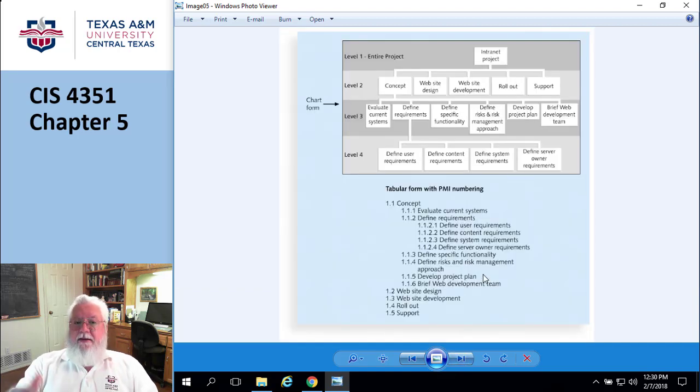So here they introduce a new term, basically called a work package, which is a low-level WBS. And this level of WBS is really like the lowest level that gets assigned in like a Gantt chart kind of scenario. And it's designed for accountability. And we'll describe what that means a little bit more after the break.